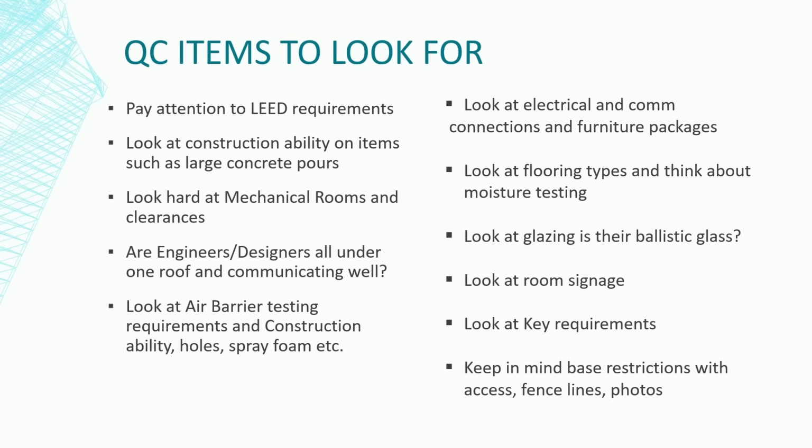Glazing. Is it ballistic glass? Ballistic glass time frame is wicked. It just seems to get worse and worse and worse. If you've got ballistic glass, you're going to need to jump on those submittals ASAP, so pay attention. Room signage. I know when you're sitting at a table right here at this point, you think room signage is the least of my worries, but we have more hiccups in room signage that holds up punch lists and final turnover, which holds up money, than I even want to count. So pay attention to room signage.